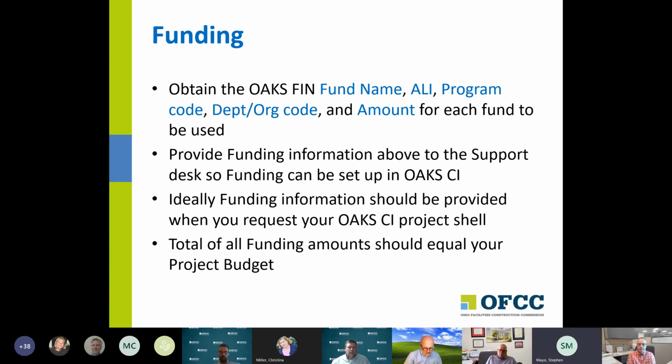On most projects, your funding amount should equal your project budget. There will be cases where projects are crossing bienniums and they're not funding all of it. And that's fine. So if you don't have funding for all of your project budget, that's not a problem from an OCI perspective. Again, when funding gets added, we need to have that communication line so that we know what it was.